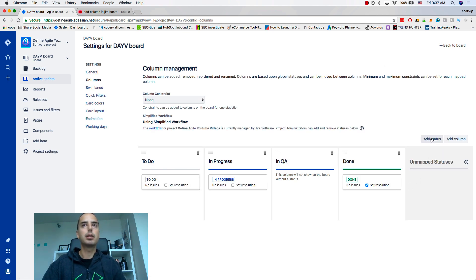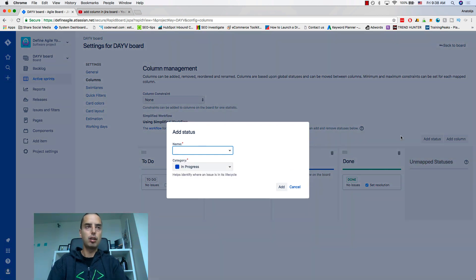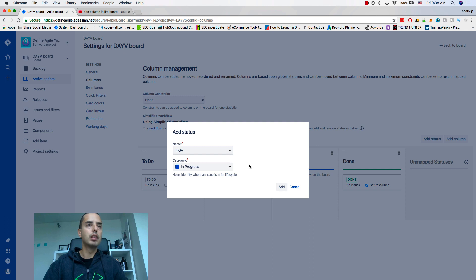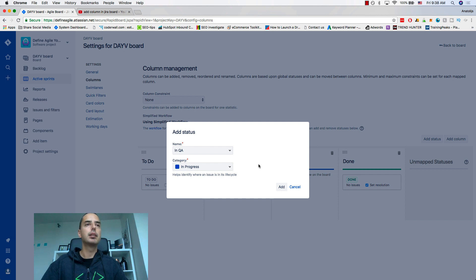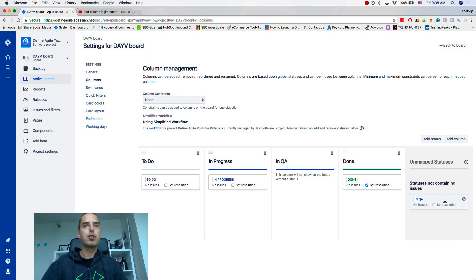I want to add a status called In QA. This is a resolution type — statuses can be In Progress, To Do, or Done. For statuses that sit in the middle between To Do and Done, I usually use In Progress. Sometimes we use Done statuses if we don't want to see the item on the board anymore, but for this purpose it is In Progress. Then I click Add.